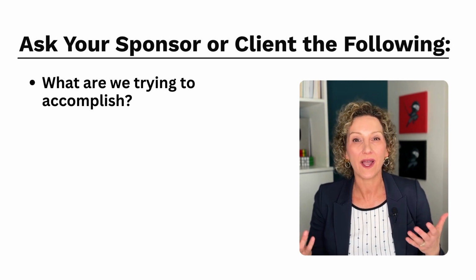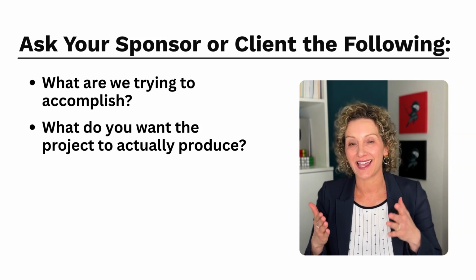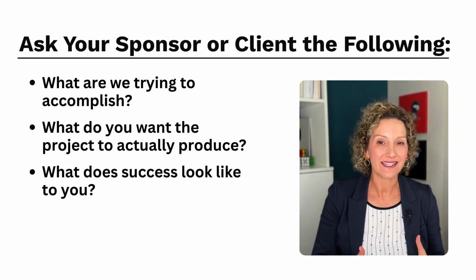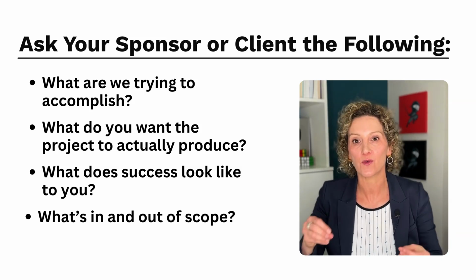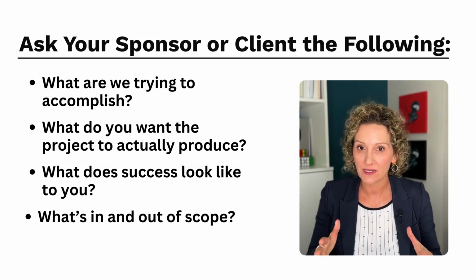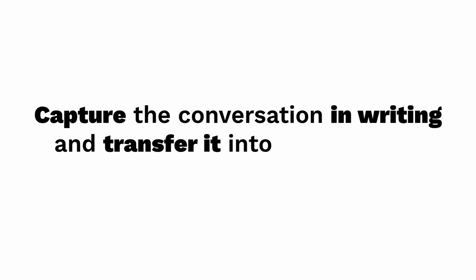So don't make assumptions. Sit down with your sponsor or client and ask them, what are we trying to accomplish here? What do you want the project to actually produce? And what does success look like to you? What's in, what's out of scope for this project? And more importantly, make sure it all fits in with the agreed upon priorities. You're not going to be saying no, but you do need to say, here's what we can do with what we've got. You need to also capture the conversation in writing and transfer it into your charter.